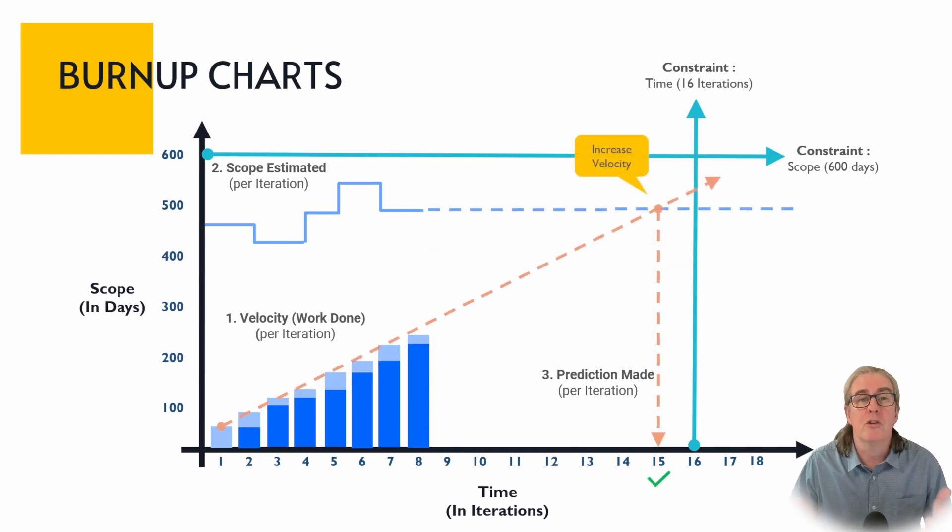The other thing that you can play with is you can increase velocity. Now here there's two different things which you can do to improve velocity. One is that you can typically just add extra resources, you can bring more people to the teams that are actually doing the work. But you can also look at efficiencies about how the work is actually getting done as well. Maybe there's improvements within that sort of development pipeline that you have that if you improve that, that would improve the overall velocity which would mean there's a better chance of you hitting this. And in this case we're making this prediction that it's going to come in on iteration 15. So we're within our 16 iteration constraint that we have.